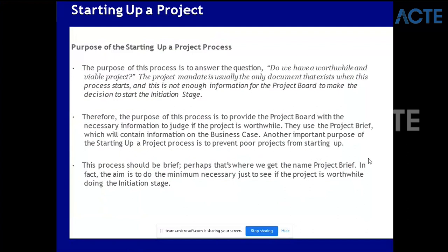We'll start with the first process. What is the first process? Definitely, anything you're going to do you have to start the project, so the first process is Starting Up a Project. The purpose of this process is to answer the question: do we have a worthwhile and viable project? The project mandate is usually the only document that exists when the project starts, and this is not enough information for the project board to make a decision to start the initiation.